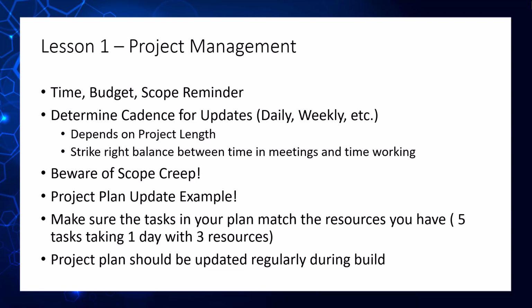So, there are some projects I've been on where they say, hey, look, we want to do this in an agile fashion, rapid updates, and so we're going to do a status meeting at the beginning of every day, and a status meeting at the end of every day, so we know exactly where we are. That's all great, but when you spend a half hour in the morning on a status update and a half hour in the afternoon on a status update, and you're sending updates to your project manager, then that's just that much less time that you have to work on the task.